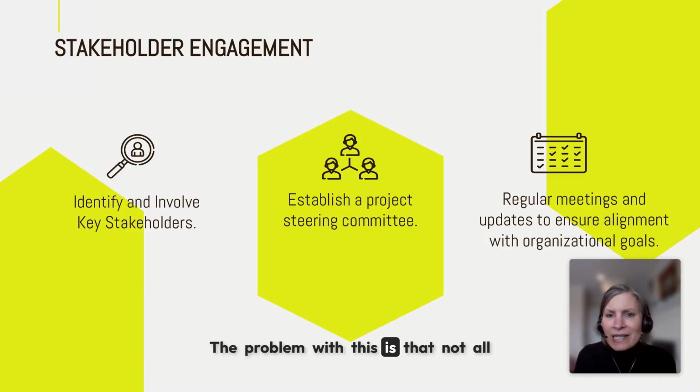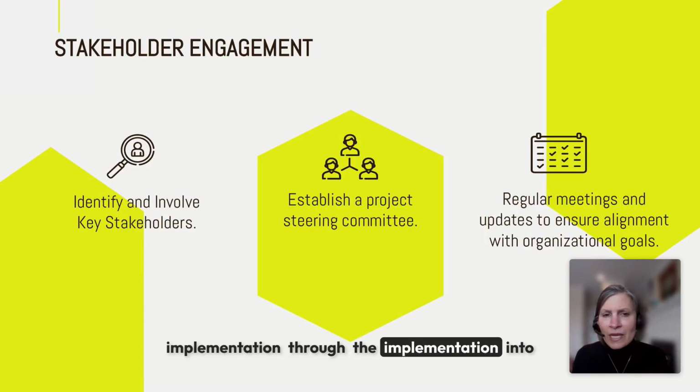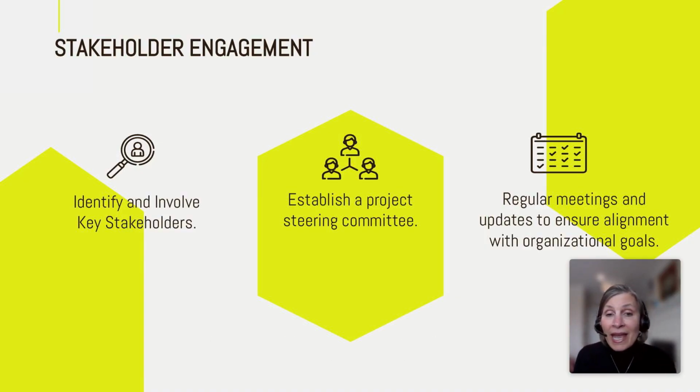The problem with this is that not all department heads or leaders know how the employees actually use the system. We had a customer where this ended up in a disaster. We got all the way through the implementation into UAT, where the users actually use the system, and the users sort of said, we're not going to use this system because it has 25 steps for something that they used to be able to do in one step.